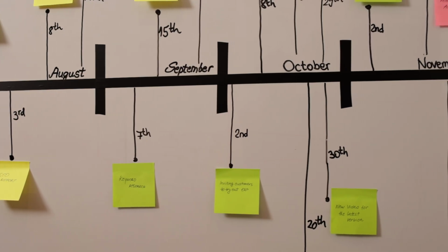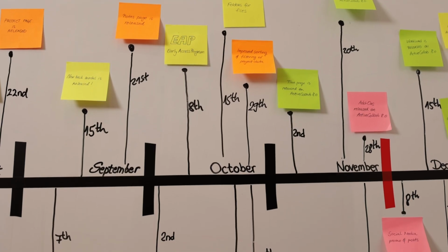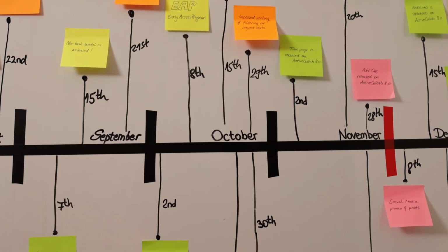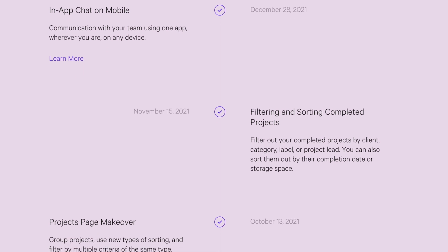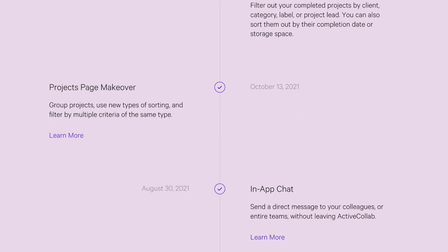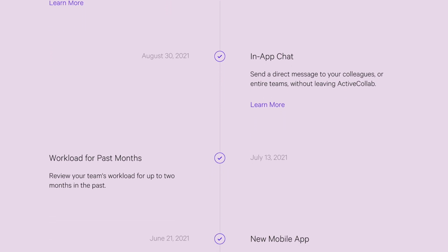How to start using a timeline. Draw a horizontal and a vertical axis. Usually, a horizontal axis represents the flow of time, while on a vertical axis, you can place achievements, sticky notes, tasks, or milestones. Alternatively, you can use a vertical axis to represent the time flow, which can be helpful if you want to represent bigger milestones or more significant periods, such as the development of an entire company through the years.